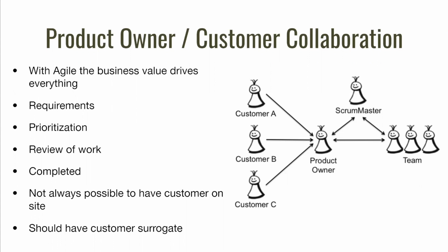And that requires understanding what these different customers want, being able to have a value system to drive those things in. And as you saw in the video, being able to populate the backlog in a priority order based on value so that the Scrum team can create this pull system and start pulling things through at a high level very easily, knowing that this is the next highest value thing. Now, if there are technical challenges and everything else, like they talked about in the video, there's obviously feedback on that. But that's why you see all these communication lines.